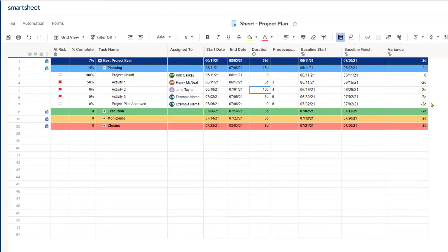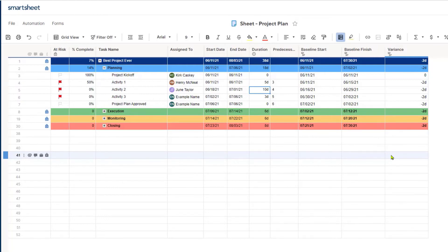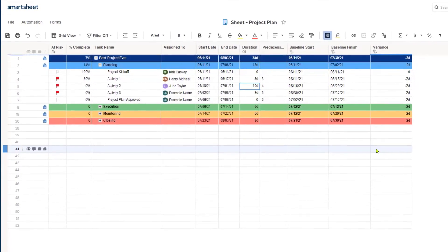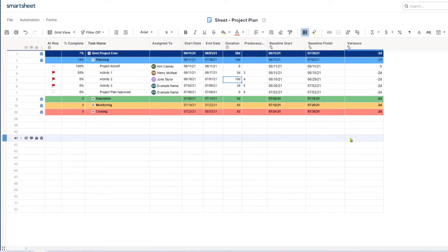This is a great tool because when people ask, are you ahead of schedule or behind schedule? If you have not set a baseline to compare your progress to, then you don't really know — unless you go back to old versions of your project schedule, which no one really wants to do. So setting your baseline is a great practice. I recommend that you do this at the very beginning of a project when you are first getting ready to begin the work. You can also set new baselines as approved change requests come through — if scope is added and start/end dates need to adjust, you may want to set a new baseline to measure progress from that day forward.